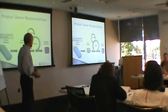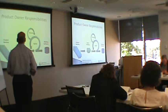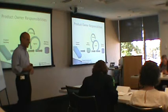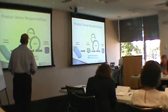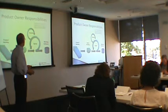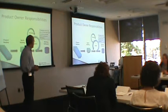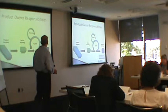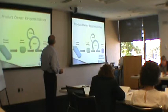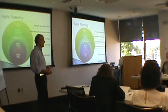The Product Owner's responsibilities within this lifecycle are: create and maintain the product backlog, organize the backlog into incremental releases, specify the acceptance criteria for stories, attend the daily scrum and be available to answer questions throughout the sprint, evaluate the product at the end of the sprint, add and remove stories if there is more or less capacity, and verify the stories as being done.